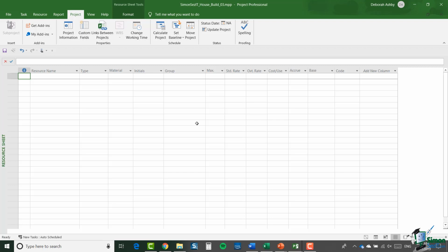So one thing I might do very early on in a project like this is prepare a budget. Now, this wouldn't necessarily relate to any very accurate estimate of costs, but I might say, for example, that labour costs are going to be $40,000 and the material costs are going to be $30,000 and the legal costs are maybe going to be $10,000 and so on. So I might come up with some budget figures.